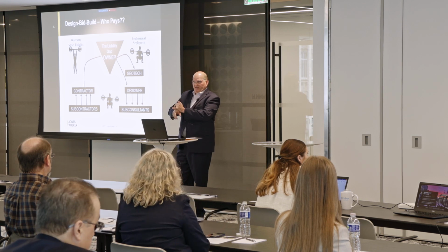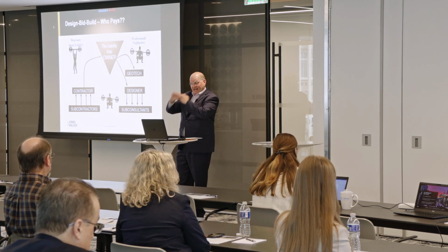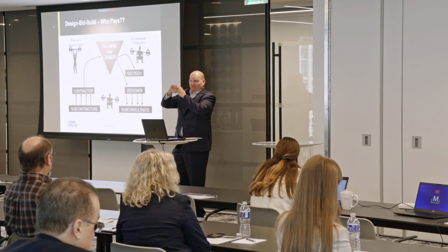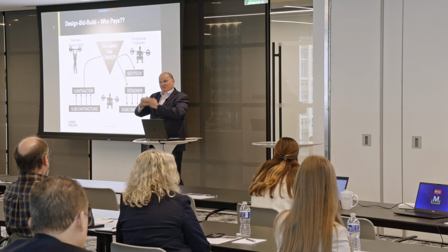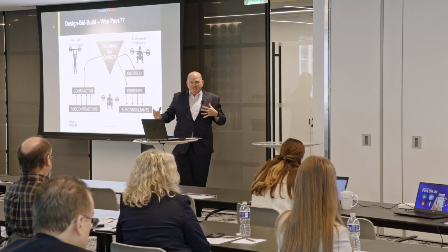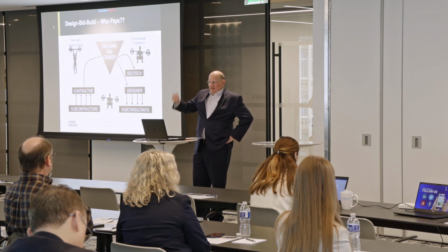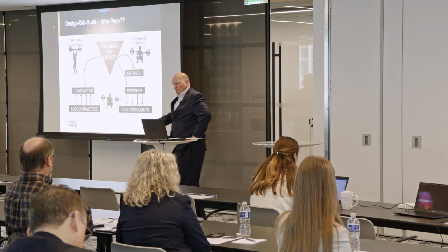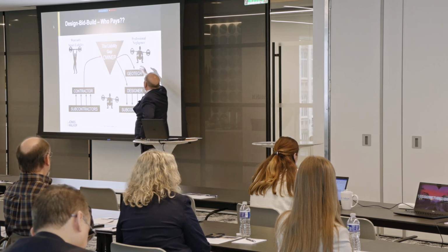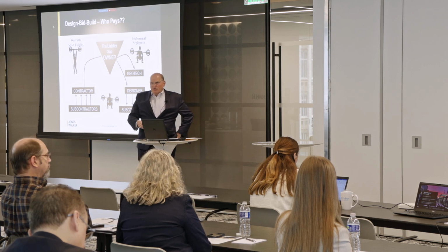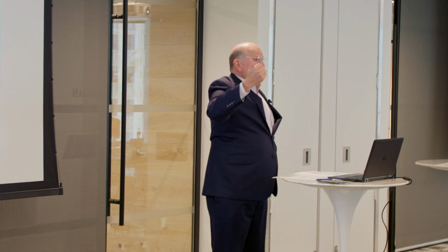You have to show a defect. You have to establish what the standard of care is. You have to prove as a matter of fact that the standard of care was violated here. And any of you that have been in this know all of those things can be the subjects of extensive evidence, discovery, expert testimony, and controversy. And then, and only then, is there liability on the part of the designer. And if you think, well, I'm going to jack it up, I'm going to make it a guarantee for them too, well, good luck with that. You're not going to get an E&O policy. That's standard routine, people know about that.